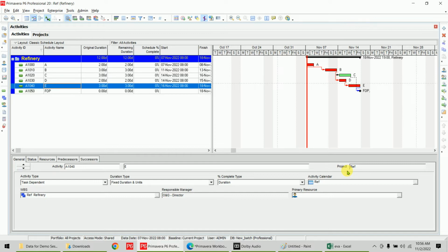I have faced that. I will tell you, in MS Project also I was doing the same. Even in Primavera, I had taken the training earlier. I recall a statement saying that no activity can be open-ended. I apply the same rule, so I have to link it somewhere, whether you link it with the milestone or with some other immediate activity.